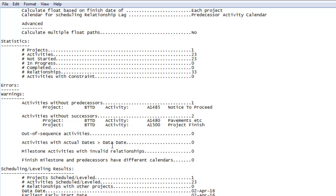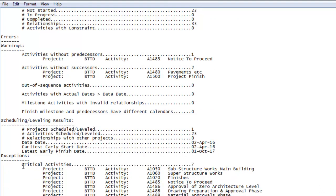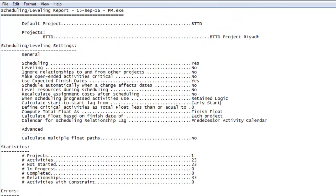Whether the scheduling options have been used properly, whether there are any constraints, whether there is any out of sequence work in the schedule. All this you will come to know from the schedule log. And in addition to this, it will also give you a list of critical activities in your project at the end.